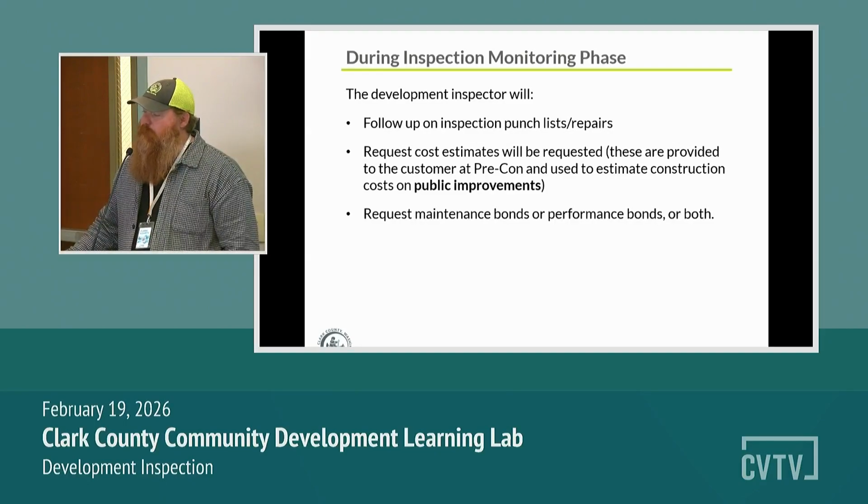The cost estimates will be requested, and they are then reviewed so that we can make sure that those are accurate. And these are, again, only on the public improvements. At this point in time, we can also request maintenance bonds or performance bonds or both.